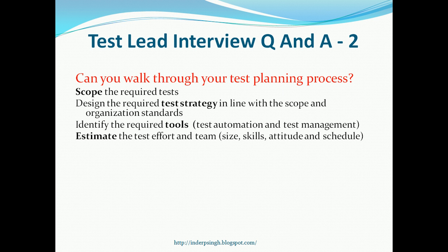Estimation is another important task of the test lead. So the test lead has to estimate what is the overall testing effort it is going to take and what is going to be the team size. Now when estimating for the team size, the skills and the schedule also have to be taken into consideration. If the test strategy is really powerful, then testing can be done in an efficient manner. So there the team size is going to be optimized and also the test effort will be optimized. So estimation involves coming up with the optimized test effort and team size that is required to do the testing.